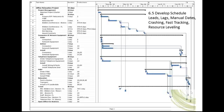In our school example, a school must accept a furniture delivery during the summer months. Another deadline constraint would be a car manufacturer has to get a new plant online in three months to meet the demand for new car orders. Or, a homeowner needs to complete a housing project in six months before winter weather sets in. Project managers must now enter any deadline imposed by the project conditions.